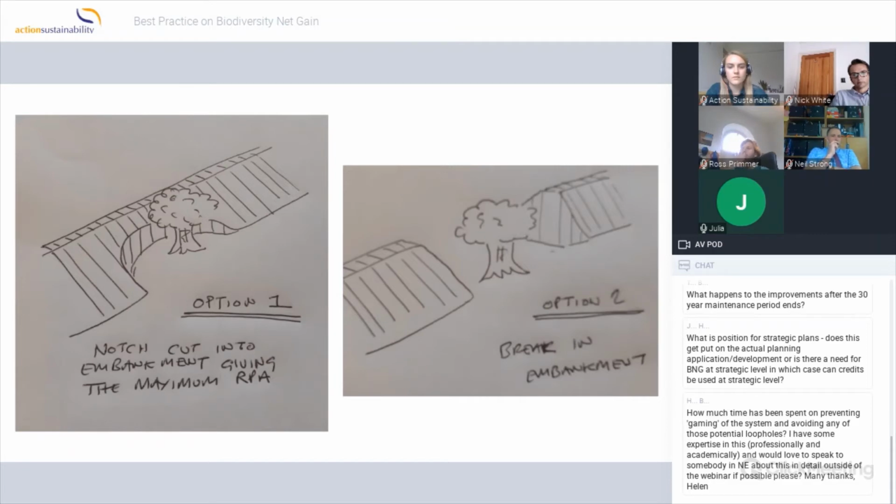We got our engineers from the construction team, we got our sub-agents, we got the landscape designer on board, and it is this cross-disciplinary look. We had to get the drainage guys to come on board, but because he started that conversation, we could then actually change the design and retain that tree. So it is possible, absolutely, but this was quite late. We did it, but it was a lot of retrofitting. So it's so much smarter and more efficient if you can bring these ideas onto the table early, and if you can bring the contractors on board early.